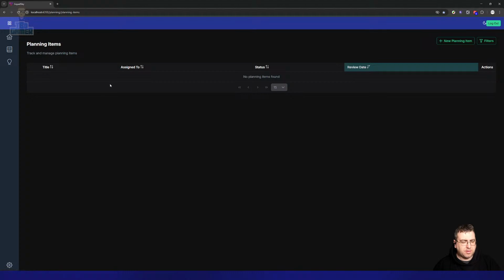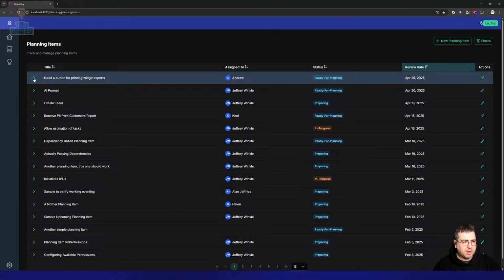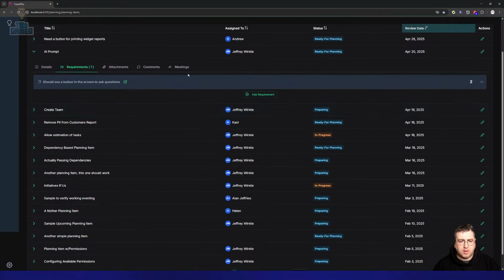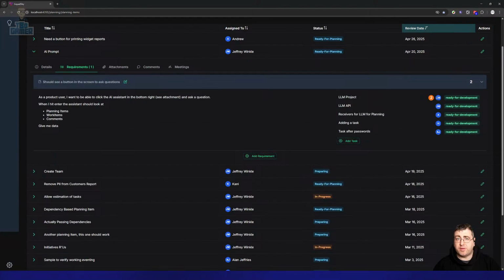So the dev version has a bit more data to it. When you estimate, you estimate the tasks. The task can be small, the task can be big, but they're estimatable, right? They don't really mean anything, they're just kind of confidence. If the devs can break things down and point those, or time estimate those, or whatever scale you want to use, it's going to show you their confidence in getting that done. And allowing them to do that means that, from the product team perspective, the total is 2, right? That's what you're looking at there so far.